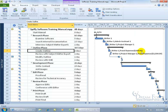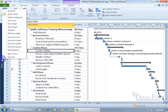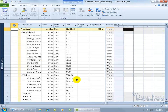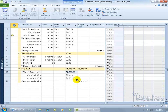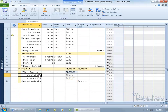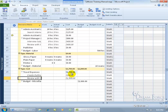We now have a total of $1,700. Going back to the resource usage view, scroll down, and travel expenses have been assigned to 'create outline' and 'review with subject matter experts,' giving me the total. I can look at the total here, compare it to the budget, and go — we're doing okay.